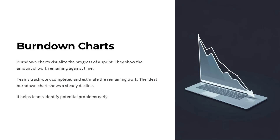Burndown charts are a powerful tool for visualizing the progress of a sprint. They show the amount of work remaining over time, with the ideal chart showing a steady decline, helping teams identify potential problems early and stay on track. Burndown charts give teams visibility into how much work has been completed and how much is left, allowing them to proactively address any issues. The data behind the chart helps drive discussions and decision-making for the team.